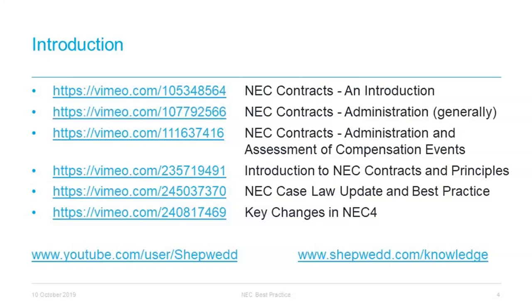Also, we would recommend good record keeping and project management, where they're both really essential. It may sometimes be necessary to look back at emails, notices, project minutes, etc., in order to consider how the contract was operated, so having good records puts you in a really good position if that sort of forensic analysis and look back is required. For example, if you don't keep a good record of early warning notices that have been given, it may be difficult to prove later that risks were warned about, and there might be a financial consequence of that.